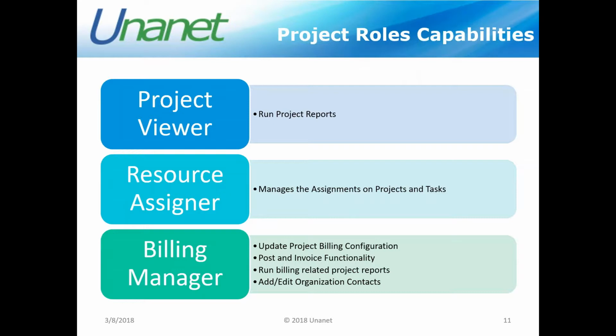The billing manager also has all of the billing post and invoice functionality. So the billing manager is able to go and run a billing and revenue post. They're able to add invoices and they're able to complete invoices. So they hold within that role the capability of all of the invoicing pieces that need to be done. They also can run billing related project reports, so they can find specific details on the projects to see if, are my numbers looking the right way and do they match up to what I'm creating on my invoices.